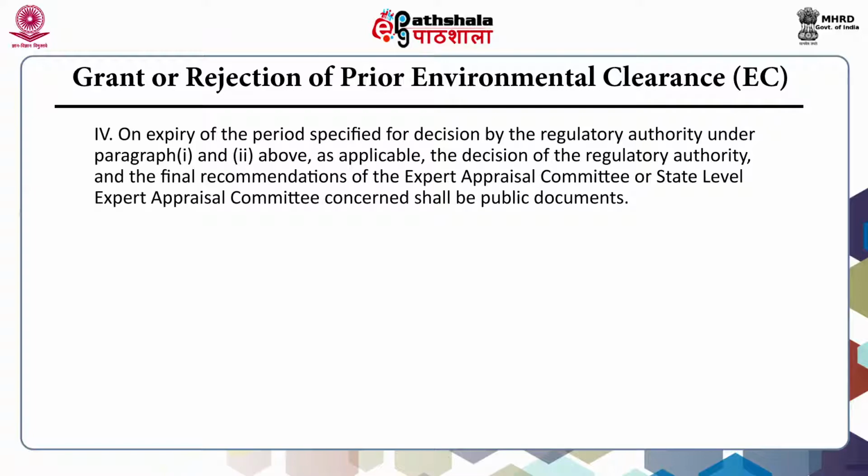Further, on expiry of the period specified for decisions by the regulatory authority under paragraph 1 and 2 as applicable, the decision of the regulatory authority and the final recommendations of the expert appraisal committee or state level expert appraisal committee concerned shall be public documents.